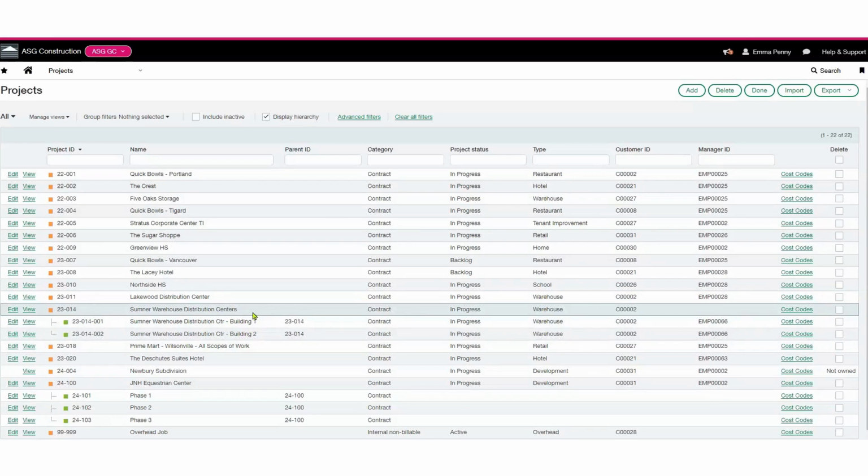And so in Intacct, projects can be set up with parent-child relationships. You can have grandchildren, you can have great-grandchildren, as I have displayed here. And what this allows you to do is to track, to invoice, build these all as separate projects, but you can still roll up and report on the parent project. With the project IDs, they can be alphanumeric, so you are able to decide if you want a sequential numbering system or a simple naming convention or a mixture of both.